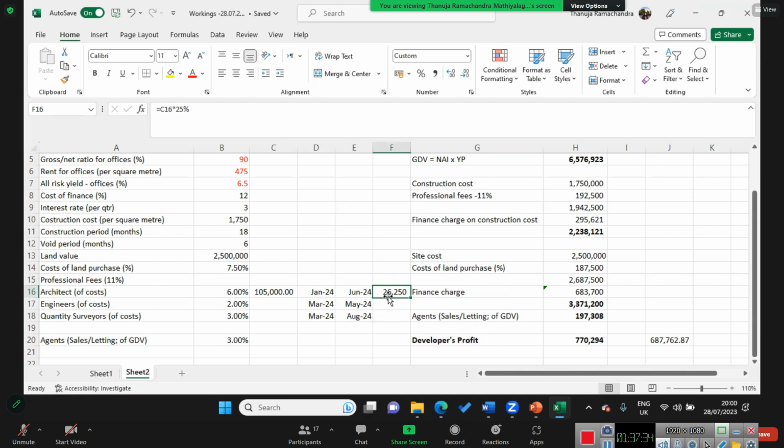Residual approach is an average approach. So we just go by the average concept, right? Whereas in the practical case, we need to go by the actual timing of cash inflows and outflows, and then we treat them for the time value of money. Okay.